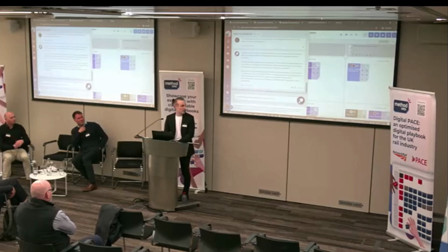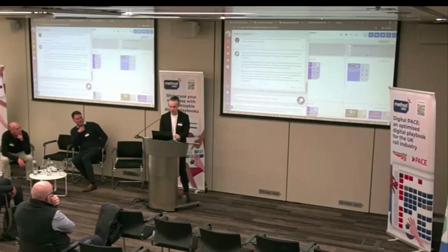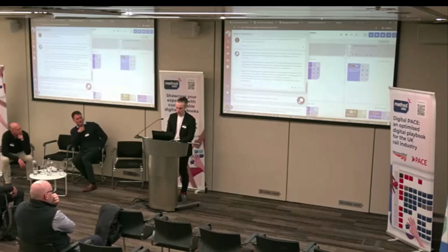Yeah, so you can see here, it's started to wrap the conversation up a little bit. It's said, let's distill the key lesson here. It seems that involving electrical specialists early in the strategic development phase allows for better planning that accommodates infrastructure limitations and ensures minimal service disruption. So it's started to distill, based on the whole conversation, what the actual key lesson is. And then it's asked me for a bit more information that I'm just going to give it. Feel free to keep talking while I'm having this conversation with the AI.